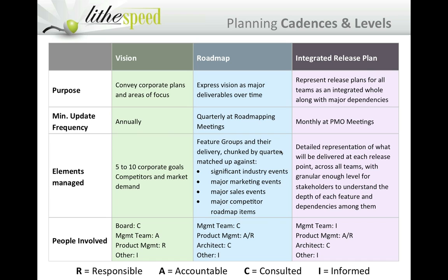Many of you may be familiar with this notation, this RACI notation as it's called. People who are responsible are basically the people that are doing a job, if you will. Accountable means it's someone that you report to; someone responsible would report to someone who's accountable. You have people who are consulted. You have people who basically get FYIs about what's been going on, get memos, and they're informed of the results. This is how you would usually see it shake out in terms of who's involved at what stages. Interestingly enough, this board can be used to tie a lot of this together well.